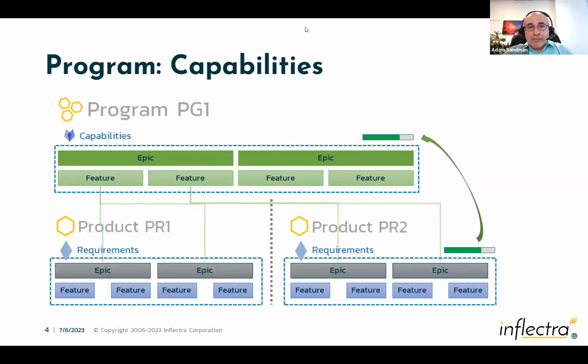And as we start to look in the future beyond this to strategic objectives at a portfolio level, you can imagine it's even one level higher. At a business level, you might say, our goal for Q1 is to be the #1 bank. That's the strategic objective, say, #1 bank in lending. And every single program and product has to map to that goal, #1 bank in lending. Any feature that ties to that goal is going to be more important, and those backlogs get prioritized. And any feature that's to do with some other strategic objective, which is more Q2, Q3, or maybe it's not that important, number one bank in consumer finance or something, maybe is lower. So it lets you prioritize at a top-down level and then track the work being done against those.